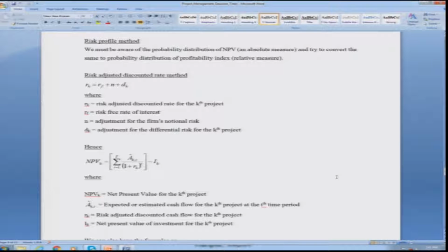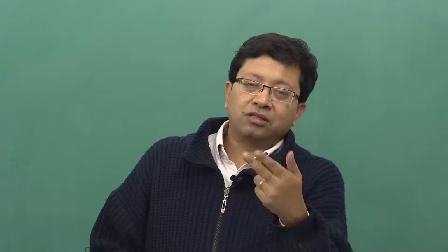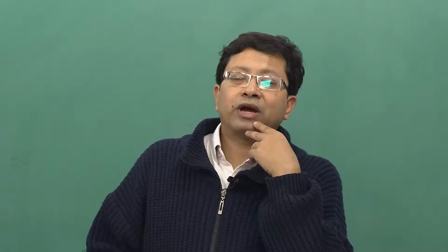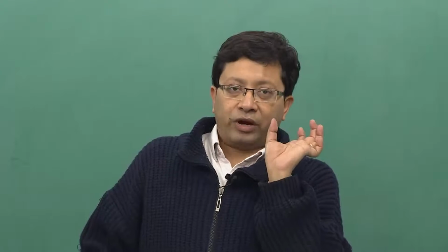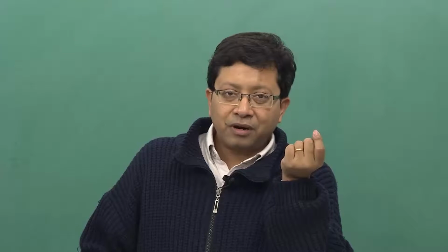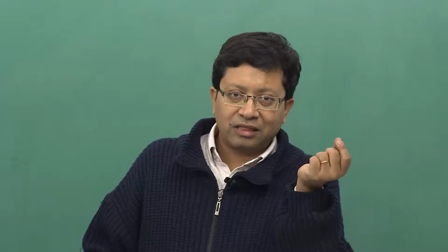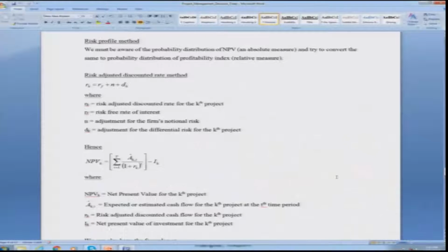Consider the decision tree analysis problem for the moped, which we did for a company trying to start with the moped just before the oil drilling example. There you had a time period of 20 years, with 20 million per year and 30 million per year, and the interest rate was 12%. So that interest rate R k, suffix k, is 12, and it may change from project to project. This whole formula is exactly the same as what we did in that problem.